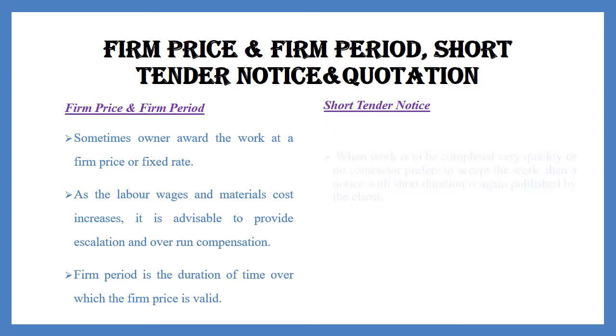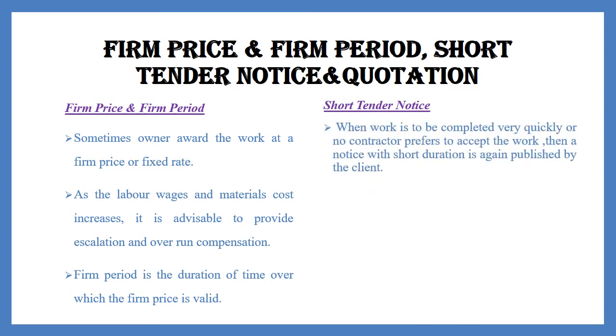What is short tender notice? When work is to be completed very quickly or no contractor prefers to accept the work, then a notice with short duration is again published by the client or the tenderer. Such a notice is known as short tender notice.